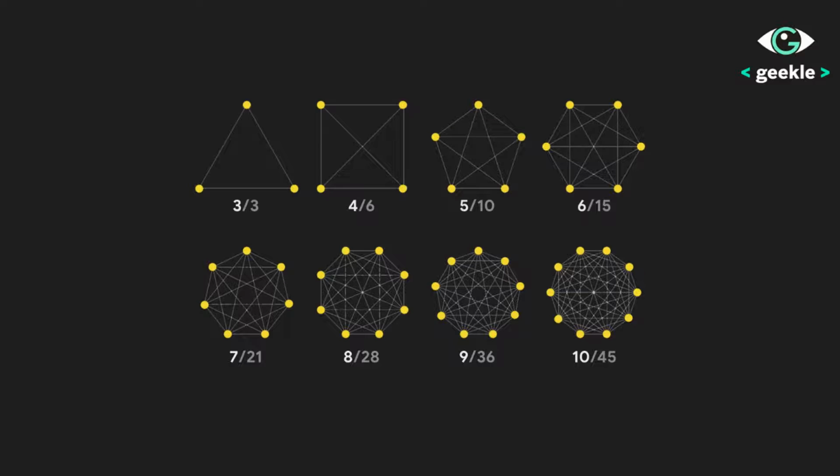A typical conversation when we talk about the scale of a team happens in this way. So here the dots are the people in the team, and the lines connecting them are the ways communication can happen, the communication points. As you see here, if you are just 3 people in your team, the communication is very easy. It's just a one-to-one relationship over here. But as soon as you scale it to 4, you add extra connection points, extra communication points inside your team. And similarly, if you go to 10, suppose your team size is 10, there would be 45 communication lines needed, so that people can come to one specific plane.